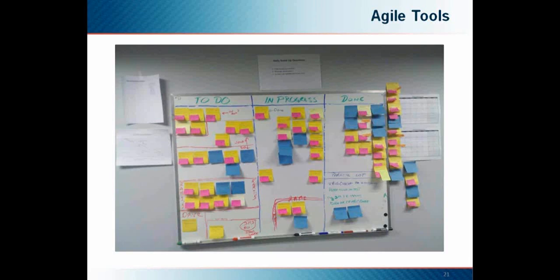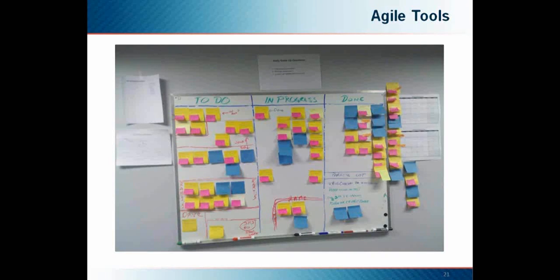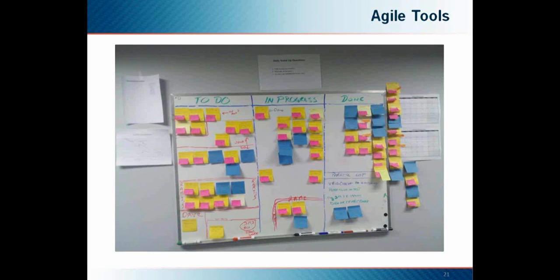The center photo is the Kanban board. On it you will see various post-it notes that represent a development task. Sometimes these are individual requirements or user stories in Agile terms. Here they're individual tasks that were divided and estimated by the team before the sprint began. Sprint, as I said before, is an Agile term that addresses the individual iterations. Many sprints make up a software release.